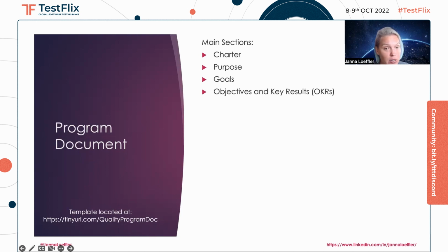But let's get a little bit more tactical. And this is where we're going to do that through, I like to use OKRs. You can also use SMART goals, but we're going to start setting some more tangible, specific, measurable goals. The important thing to know here is that they have to be measurable. So we're going to look at maybe one of your objectives is to improve the quality of the project. Well, one of the key results of that is passing automation and integration tests with every pull request.